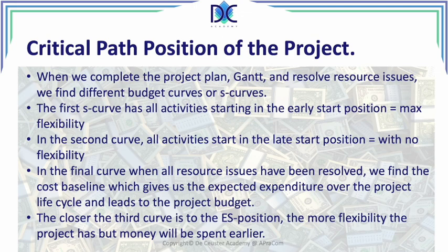This can have some important effects because the later we spend money, the less we will pay for using that money. And it can improve our cost position. Let's look at the net present value, the internal rate of return. Selecting or pushing the expenditure to a later time will improve those parameters.